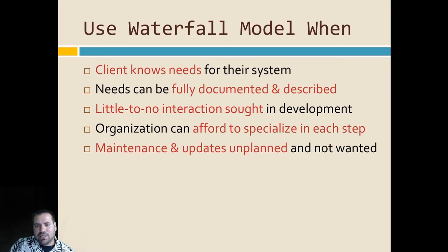And in addition, the requirements are actually specified through the regulations. A defibrillator has to do this very, very specific thing. It has to deliver this voltage through these contacts using this hardware. It's very specific what it needs to do. So you actually do know the requirements ahead of time, and you know what you have to build. That's when waterfall can work really well and can really shine in those two industries, finance and healthcare.